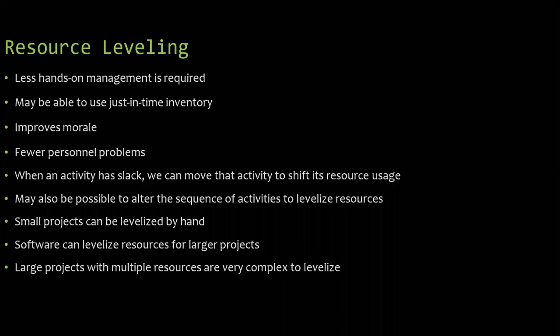What are your daily resources required, in the case of material, manpower, etc.? Every morning that much should be available, so that is called just in time. If you require 100 bags of cement today, then only 100 bags of cement should be ready today. That should be available. For tomorrow, how much is required? Tomorrow's stock you don't keep today. Tomorrow morning, whatever cement bags are required will be available to you.